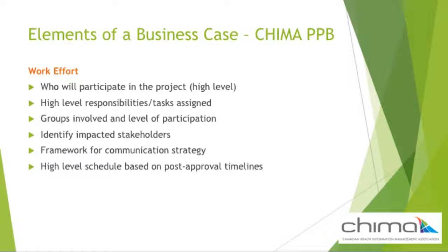Similarly, you should have a high-level idea of what the schedule will be. This would be at the milestone level. You won't have detailed tasks identified yet or know how long each task will take until the business case has been approved and you can do detailed planning and know what resources are available. This schedule is based on post-approval timelines. Rather than give specific dates, they will be termed as so long after approval.